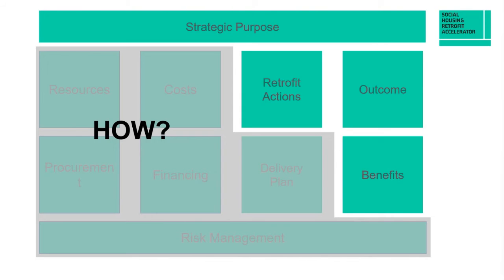And one thing you can do is create a one-page overview of the project. So you can put a few words in each of these boxes to give a simple one-page overview of what the project is and how it is going to work. And you can also color code things, red, amber, and green, and it's a good way of giving that instant one-page overview. Where are we up to? What's working? What's not working?